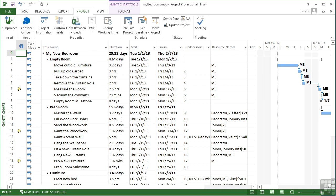We've controlled how long a day is by changing to seven and a half. Anywhere we've specified a day previously that was calculated as eight hours, so we're now shortening the day to seven and a half, it has a knock-on effect to all your tasks. So that's why the default assumptions there must be entered on a new project.